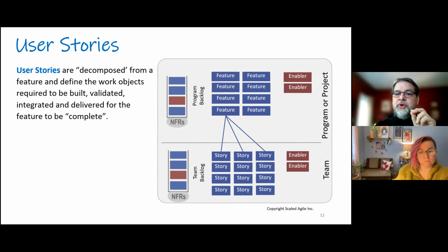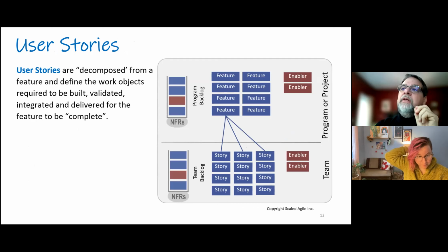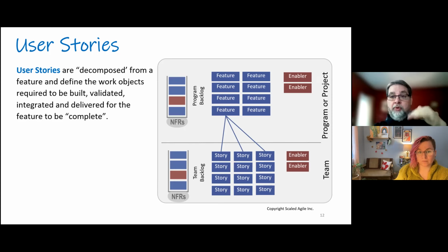And again, user stories are children of features. They are basically your small units of work that you can put into a backlog, a queue, and then pull from that and bring it into your plate. Don't put more on your plate than you can fit, that are prioritized, basically shadowing the priority of the features. So however you've prioritized the features, the stories will inherit that prioritization, but you may need to do some sequencing work down there as well.